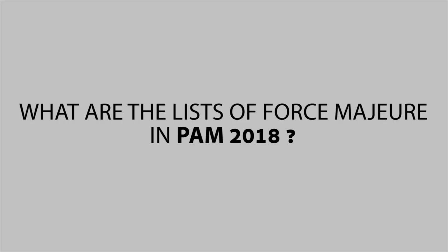In the form of contract PWD 203A, the list of force majeure incidents did not specifically mention epidemics and pandemics. However, it did include that the COVID-19 pandemic would affect the ability of the contractor to secure goods, materials and/or services essential to the proper carrying out of works, which will entitle the contractor to an extension of time.